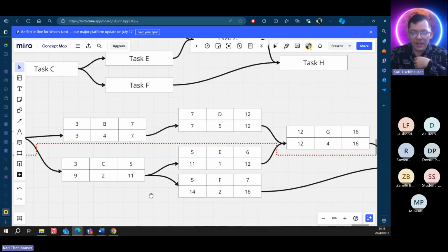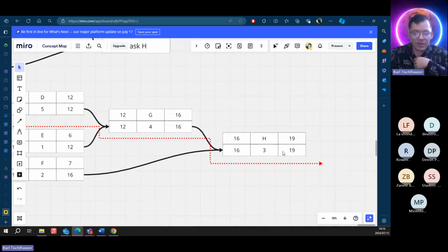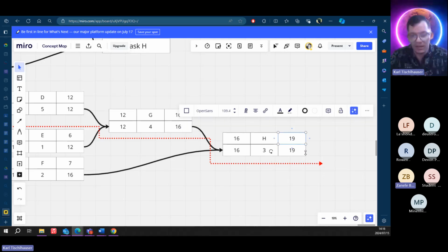Okay, then once you get to the end, you'll have all these gaps on the bottom, and that's when you minus your way back. So the earliest point we can finish is on day 19. We want to finish on day 19, so we're saying our latest point for finish is day 19. We don't change it. We don't say the latest point we can finish is day 20 or 21. We want to see which activities can be moved around. That's why we don't change this. This must be 19. This must be 19.